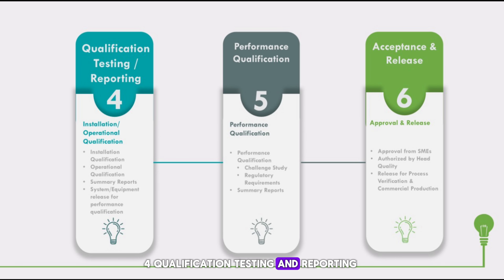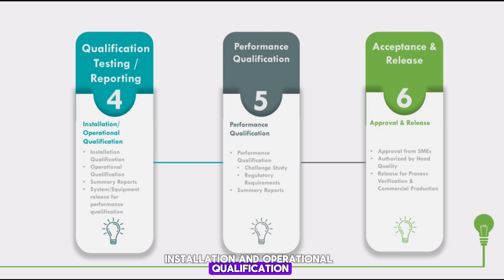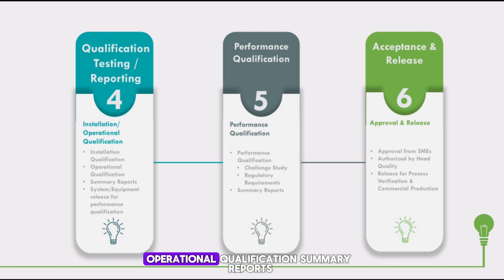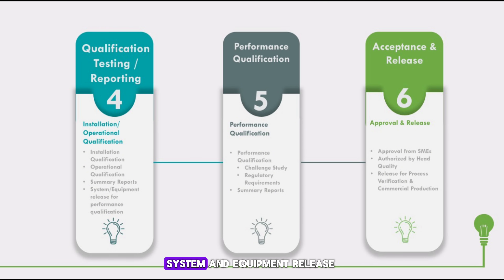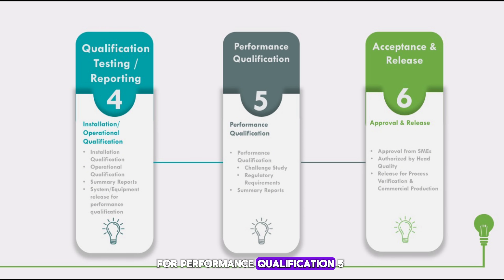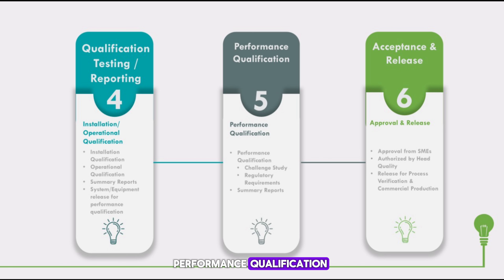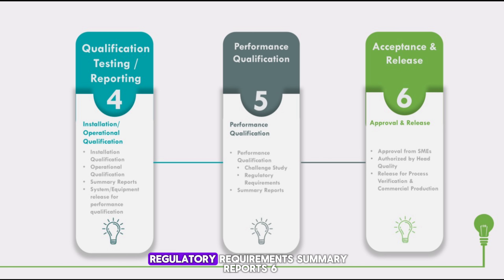Step 4 — Qualification Testing and Reporting: installation and operational qualification, which includes installation qualification, operational qualification, summary reports, and system and equipment release for performance qualification. Step 5 — Performance Qualification, which includes challenge study, regulatory requirements, and summary reports.